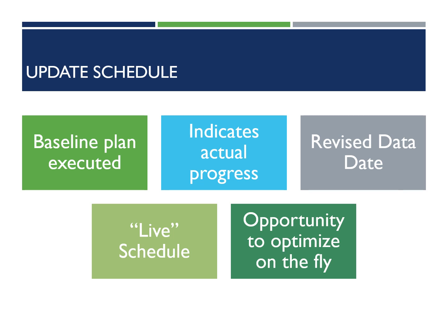You also hear the update schedule called the live schedule. When we're doing our update schedules, we're updating the baseline plan, but we can also use the update schedule to figure out ways to manipulate logic to still achieve the goals of the project. If we need to recover from some sort of delay, we're going to use the update schedule to figure that out and do time impact analysis and things of that nature.